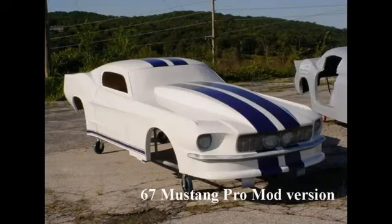Budget impact. LJRC reviews the budget and analyzes spending trends. They identify potential areas for reallocation, such as reducing material costs for certain car parts, for example, opting for a different, less expensive aluminum alloy for the interior roll cage without compromising safety standards, or negotiating extended payment terms with suppliers. By finding $8,000 in savings, they can reduce their reliance on the contingency buffer while still allocating $4,000 from the buffer to cover the remaining cost of the rear wing.